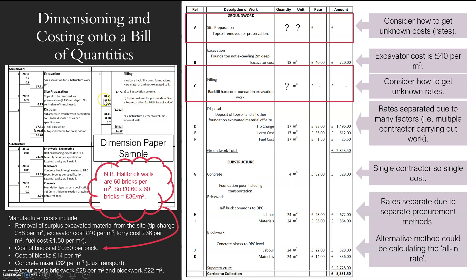On my left I've got my topsoil in meters squared, and on my right I've actually worked out the topsoil in meters cubed, so I can put the quantity depending on what's required. The unit — I don't know yet, because for topsoil removal: do I use my excavator at £40 per meter squared, in which case I put meter squared, or do I put meter cubed? That's up to you to work out.